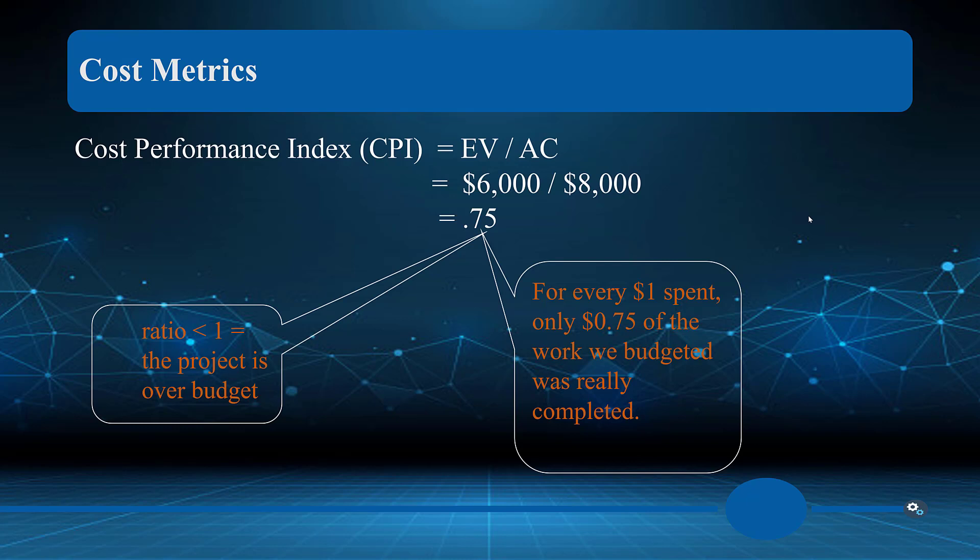The better way to look at this is to get a percentage or ratio — the cost performance index (CPI). If we take six thousand divided by eight thousand, we get 0.75, meaning for every one dollar we spend, we're only getting seventy-five cents of the work we budgeted actually completed.